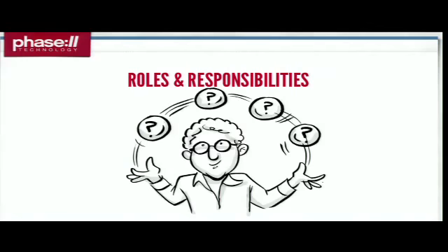Remember, dependencies within a project are often as damaging to the schedule as dependencies outside the project. So if I'm the themer and I'm waiting on the information architect to provide me wireframes, and it's a week late, that affects me. It impacts me. And the damage that it does to the schedule is bad. The damage that it does to our working relationship in terms of how I hold them responsible or accountable for my own failure can be even worse.